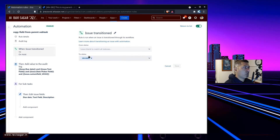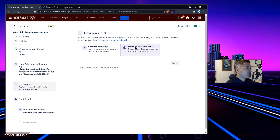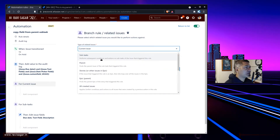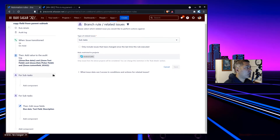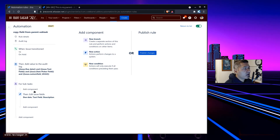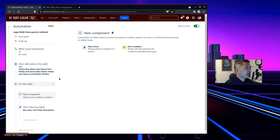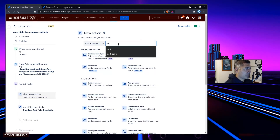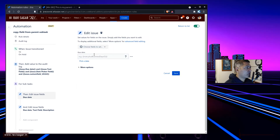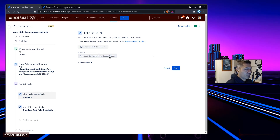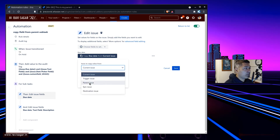What we can do is trigger this rule when issues transition to 'On Hold'. There is something called a Branch — when you create a new branch, you click on 'Branch Rule' or 'Related Issues' and you'll find an option called 'Subtask'. For the parent issue that triggered the rule, you now want to work on the subtask, so just select it. Then add a new component and select 'Edit Issue'. You'll find the action where you can select fields like due date, and you can set it manually or copy it from the parent — not the current issue. Just change it to be copied from the parent, and that's it.